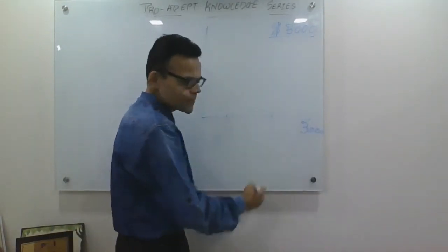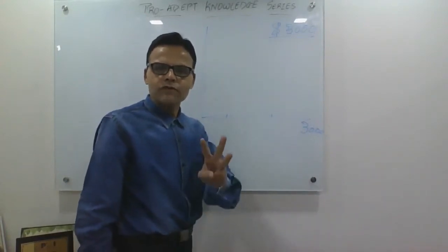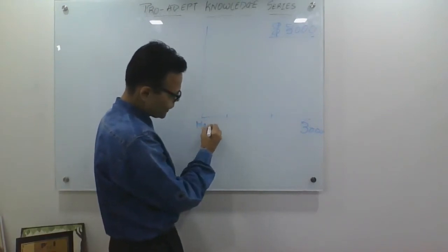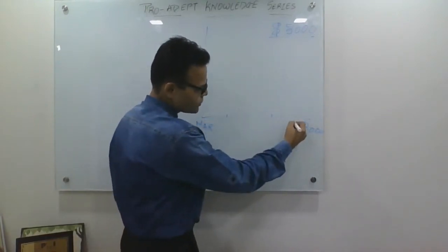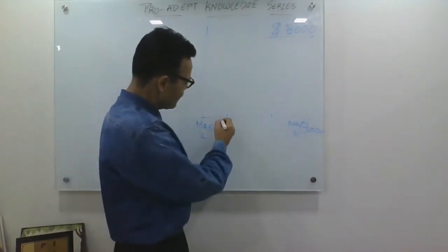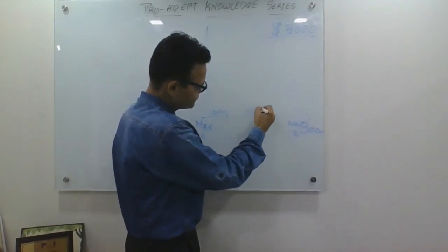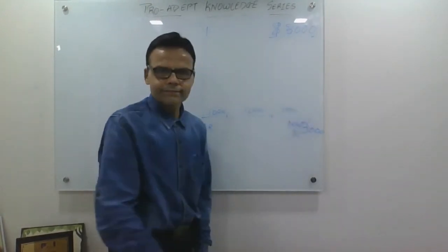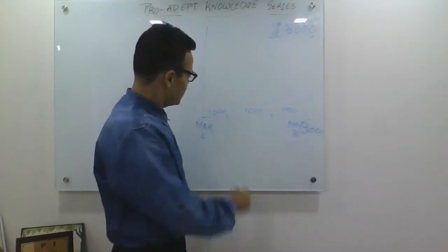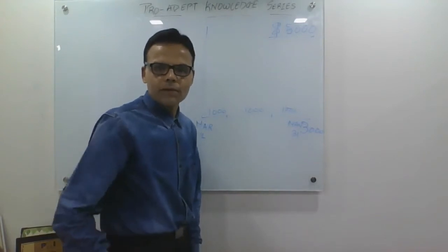A time phase budget is equally divided into 3 phases. The project starts on March 1 and the project ends on May 31st. Every month, my budget is $1,000. This is the monthly budget for me. This is my time phase budget, which is equally divided into 3 months.